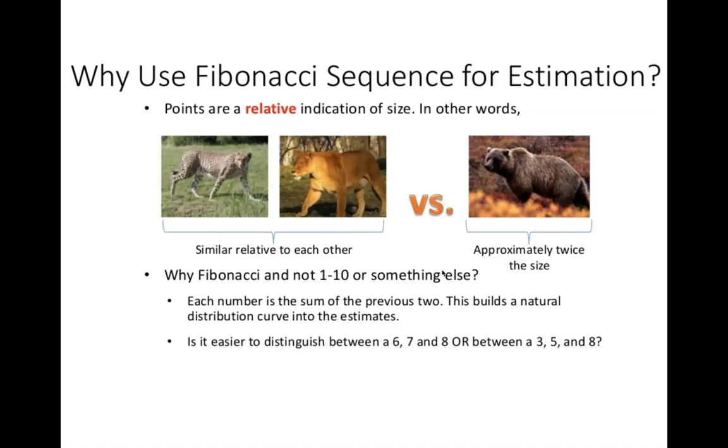If we are considering 4 unit points or 5 unit points, we should break the user stories down further. Then only can we understand, yes, this is one user story point, when comparing with a small story point or a big story point. We can break the big story points into smaller user stories.